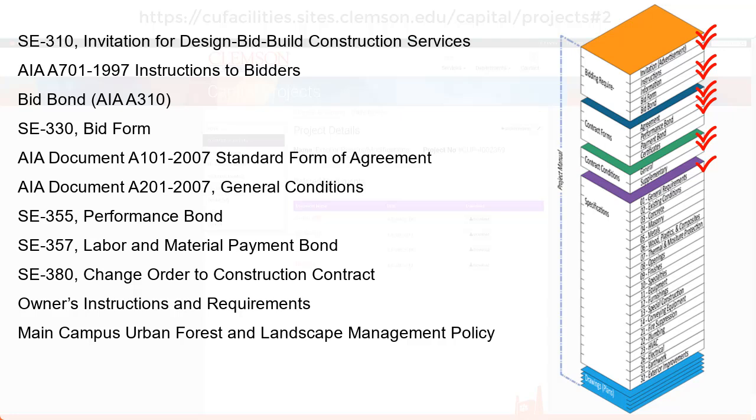But I haven't seen anything about the drawings. The drawings are actually missing from the table of contents as a reference. So maybe they're in the specifications. We start where the actual specifications begin, and we see that the specifications have an 01 section, which is general conditions. So here are some more supplementary conditions to the contract. One of the very first things in that 01 section are related documents, drawings, and general provisions of the contract. So it does reference the drawings there.